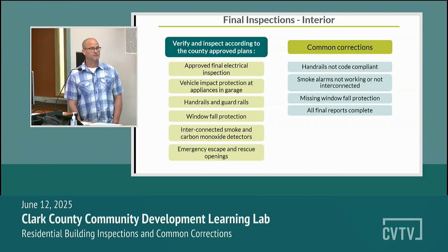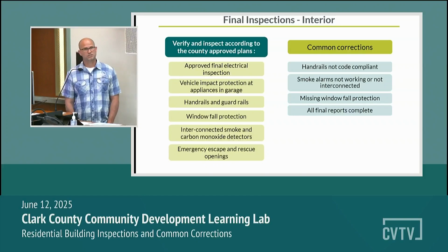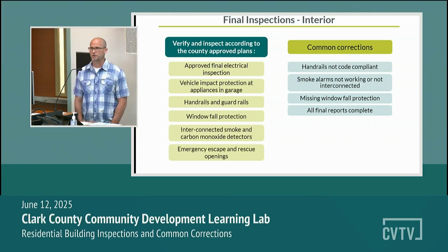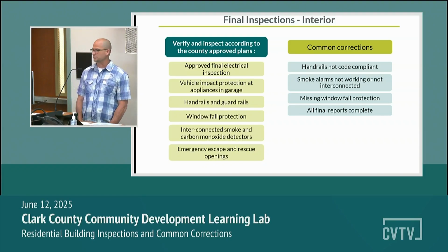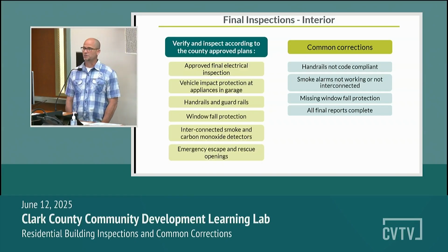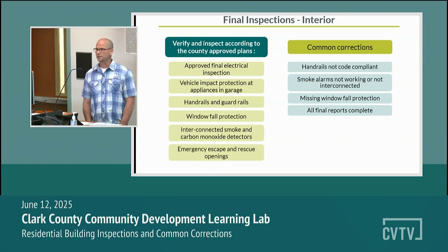Handrails and guardrails at the stairs. Now, this is just like when we talked about stairs. There's a lot of dimensions and requirements that can go into handrails. So if your finished carpenter is not familiar with those, please reach out to us ahead of time. Ask us. We can tell you the dimensions or how we measure or what we look for. It's a lot easier to talk ahead of time than us coming in at final and making you move a handrail, and now you're trying to patch sheetrock and repaint it and get the painter back out there at the last minute.